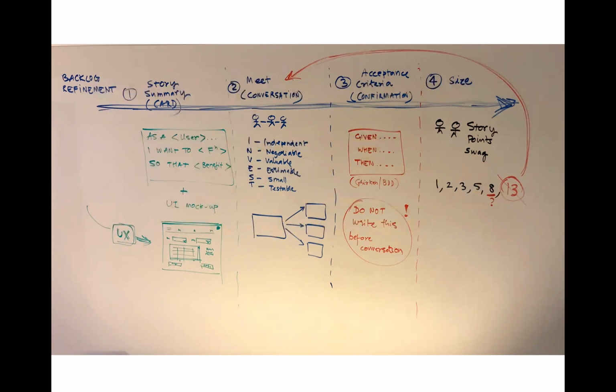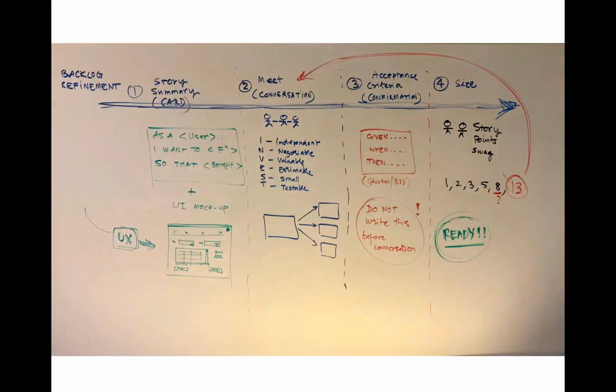So there you have it. Simple 4 steps, and your stories are in this ready state. This concept is also called definition of ready. All this contributes to the health of your backlog. If you're working on a serious complex product, it is highly recommended that you get the stories ready for the next 3 to 4 sprints in your backlog. In the process of attaining this health, you will also effectively manage your risk and avoid any surprises.